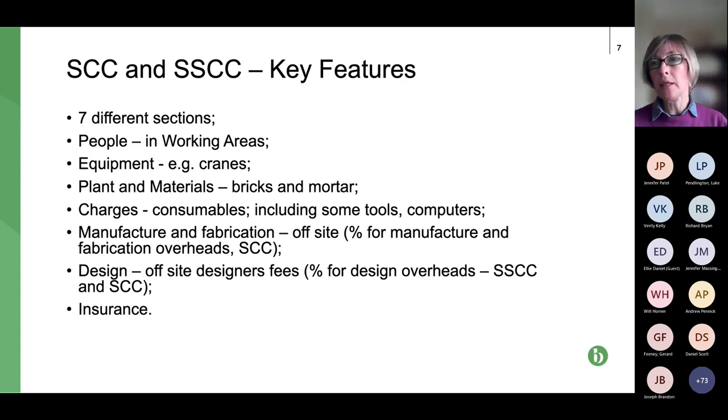So it's quite niche. So please do not think that it's going to assist you in recovering any insurance costs or premiums that you have to pay. That is covered within that fee percentage. So you need to factor that into the percentage and make sure the percentage covers it, as well as overheads, as well as profits. Next slide, please.